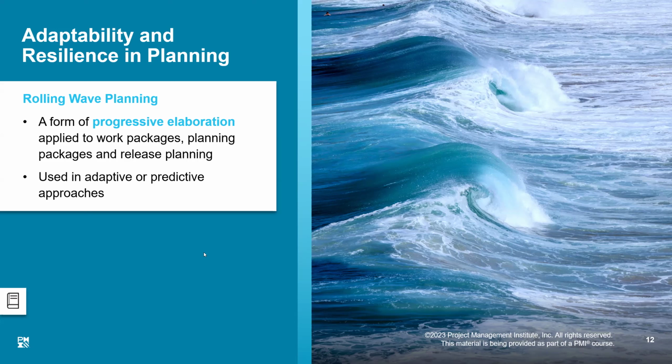That would be called our rolling wave planning. Although the concept is very similar, progressive elaboration is applied at the strategic level, at the project or phase level, but rolling wave planning is applied at the work package or activity level. So the unknowns, which could be planned later or elaborated later within the work packages or activities, could be considered